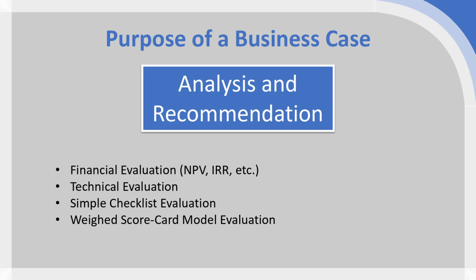So you've got a few different ways you could achieve this, and this depends on the kind of project you're running. So you could choose to use financial evaluation tools. So we have net present value to identify the value of the activities involved, as well as the internal rate of return. So you could argue that actually this project will return X amount of revenue, or it will save X amount of expenditure. So you can evaluate that against the financial cost of the project.